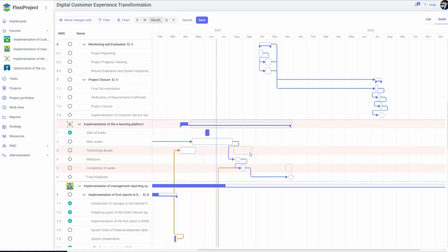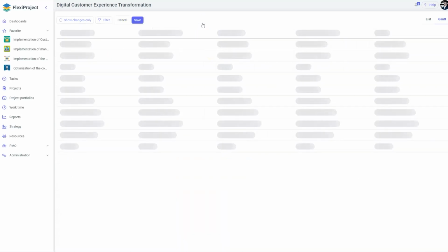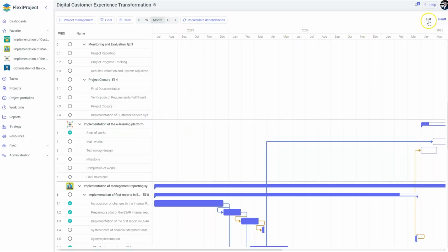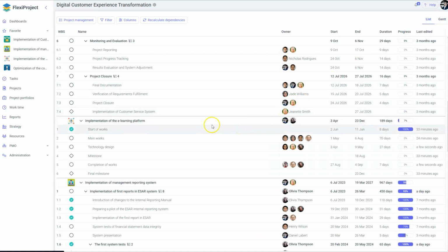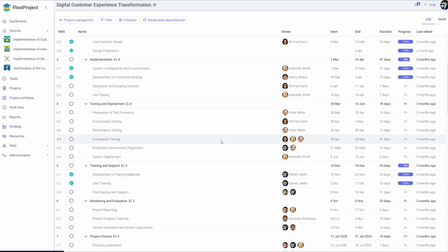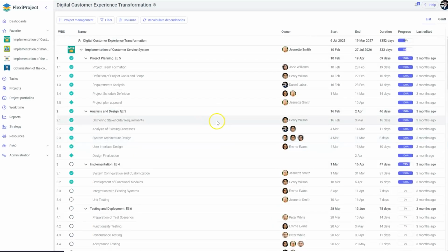In this case, for this task that should be August and September, and now it shifts. If we accept the changes, we click Save, and those inter-project dependencies are saved as the current schedule. And if we save it, that means the changes are saved in the schedule of the specific projects affected by the dependencies. Including these dependencies has impact on the schedule in the given individual project.